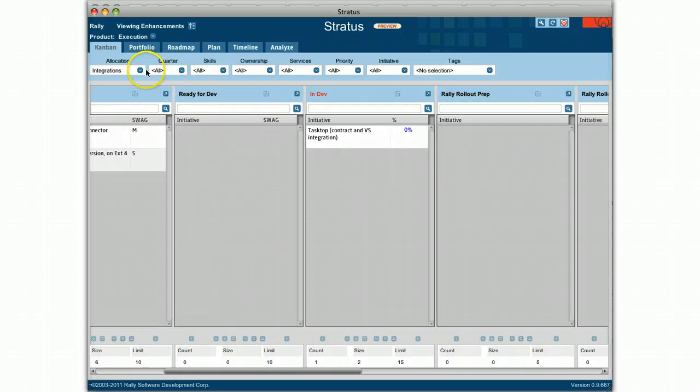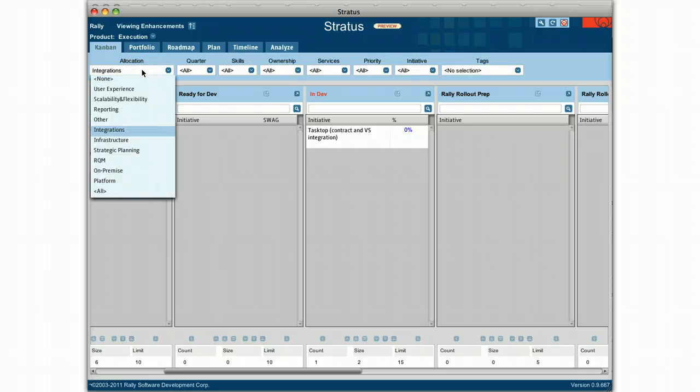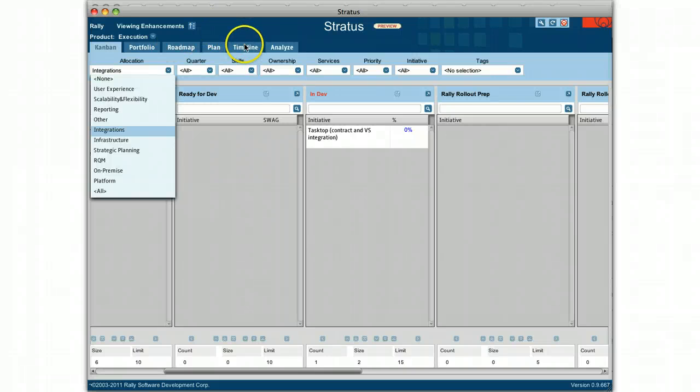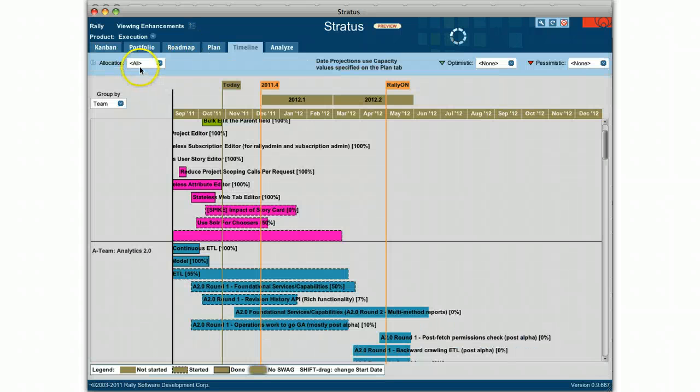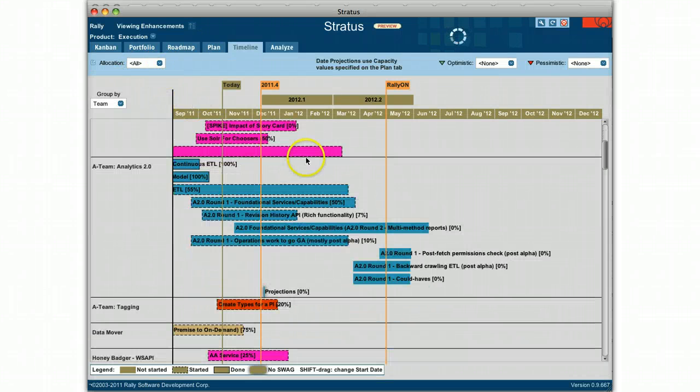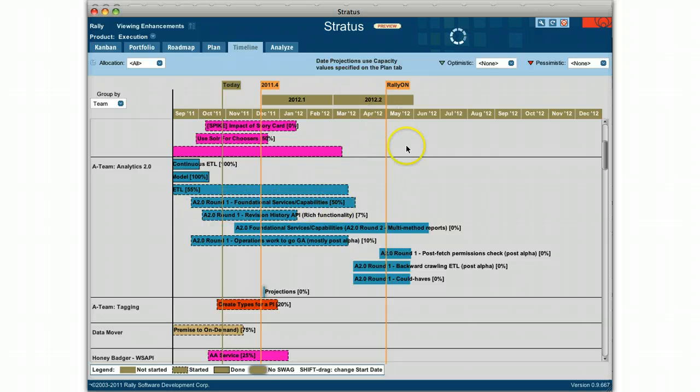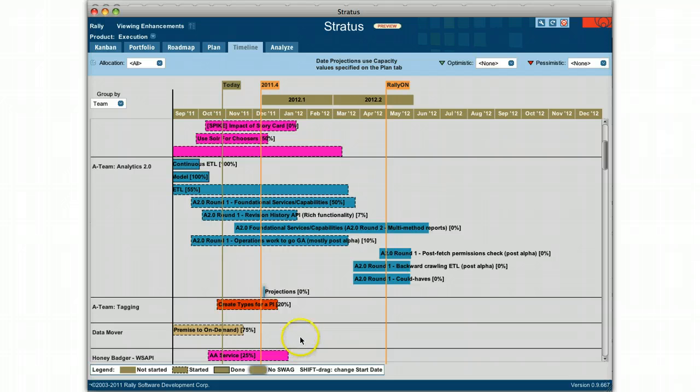So this is the perspective, this allocation perspective that our portfolio council deals with. You can do what if analysis. We can look at the timeline for all of the initiatives in progress. We can just filter them down to a particular allocation to look at one. We can do what if analysis, see when things are likely to finish, if they get more or less of an allocation. That's the whole idea behind our portfolio management product, Stratus.